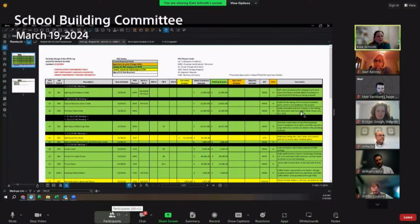And it has to do with changes to the folding fire door posts in the track system for the wand doors, one on each floor. PCO 52 ball valve at balancing valve. This is a credit for $4,121. There's two of these ball valves in the drawings and only a single ball valve is needed. So this is the credit for the difference.